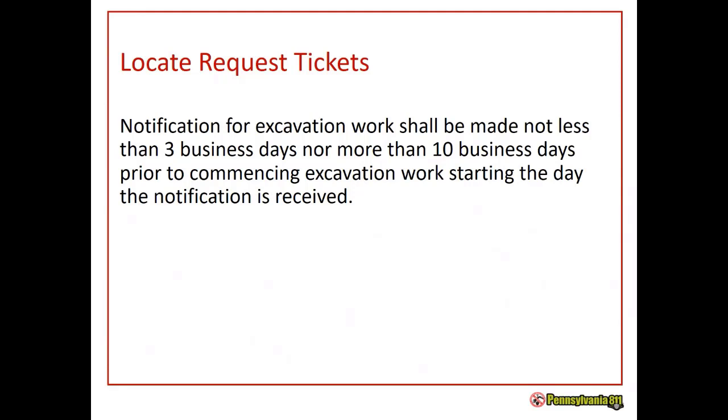In 2019, we had over 1 million tickets that were called in. We are on pace to hit that 1 million ticket notifications in 2021. You have to place the routine ticket 3 to 10 business days in advance of your excavation, and it's limited to 1,000 feet or intersection to intersection, whichever comes first.